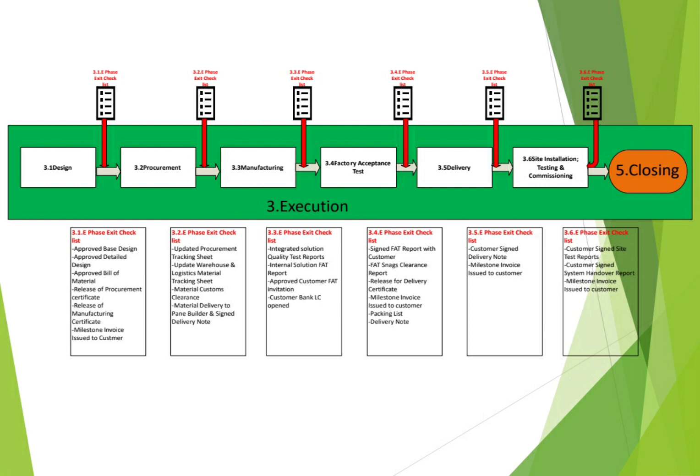Okay, after that you also need to check the milestone invoice issued. You need to share a draft invoice with your customer, because now you are going to deliver, so he needs to give you any comments on the invoice, or confirm it is okay, so that once you have done the delivery and the signed delivery note is available with you, you can submit the necessary documents, the invoice and the signed delivery notes, to your bank, so that you can cash this amount.